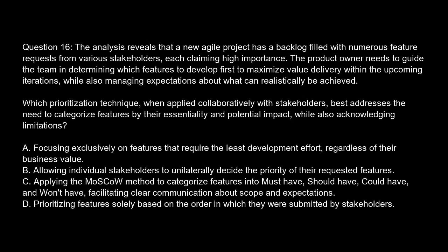Option A. Focusing exclusively on features that require the least development effort, regardless of their business value. Option B. Allowing individual stakeholders to unilaterally decide the priority of their requested features. Option C. Applying the MoSCoW method to categorize features into must-have, should-have, could-have, and won't-have, facilitating clear communication about scope and expectations.